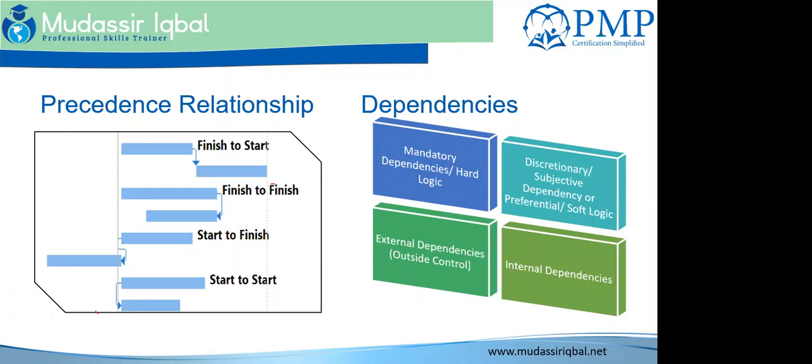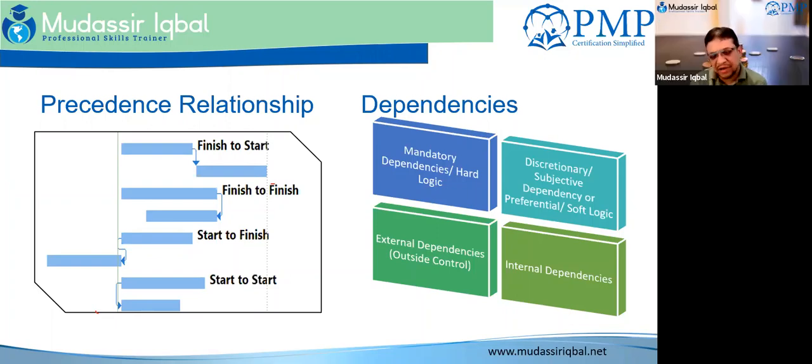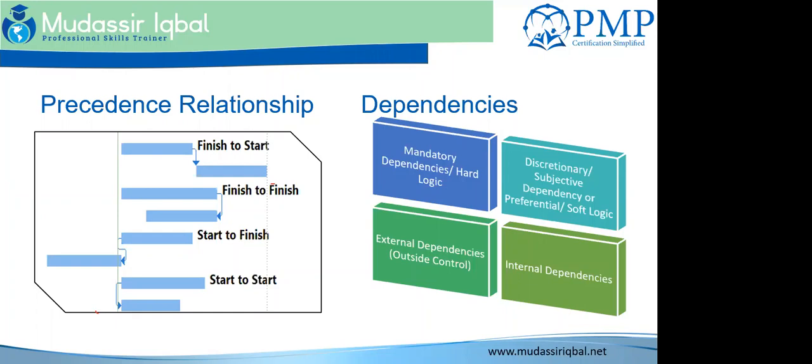But is that similar to what you're preferential? I mean, to a large extent, yes. Just building on what Kashif said, he was talking about the same resource, multiple walls, but the same unit with multiple resources potentially, like a door, for example, painting and installation of the door knobs. You're working on the same area, but potentially you could have that as a subjective dependency that you could work around, when the knob installations happen versus the painting of the door.